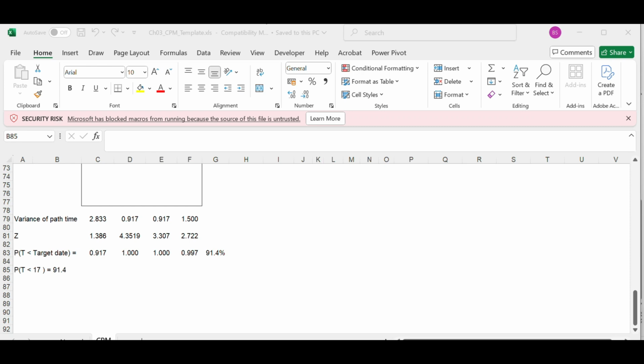Order of magnitude method is used in the early phases of the project life cycle, especially in the pre-initiation phase, for example for selecting the projects. Its accuracy is usually low. We can say its accuracy is like plus or minus 40 percent. It's the first set of decisions that you can make in a project. We use the analogous cost estimation for this order of magnitude method. We consider the historical estimates plus some new realities. Analogous estimation talks about the similarities with other projects. It is a top down estimation method or an aggregation of estimate method. Here, the cost of estimation is low.